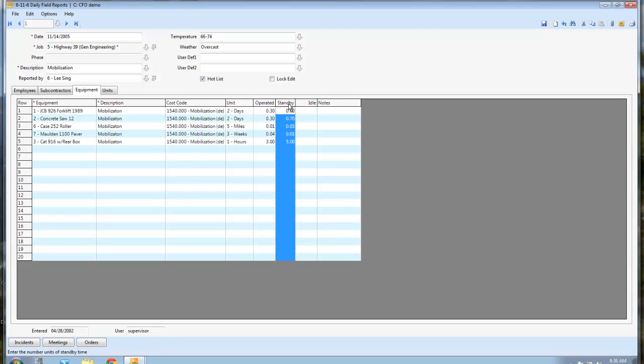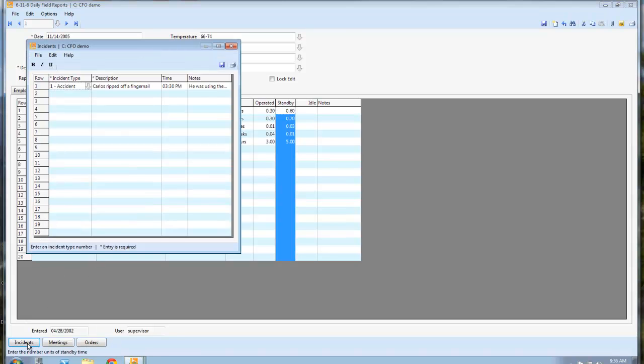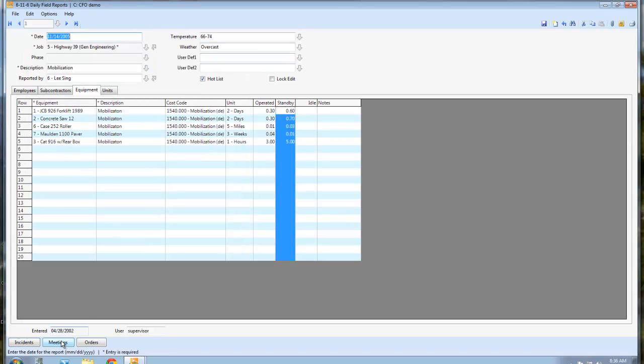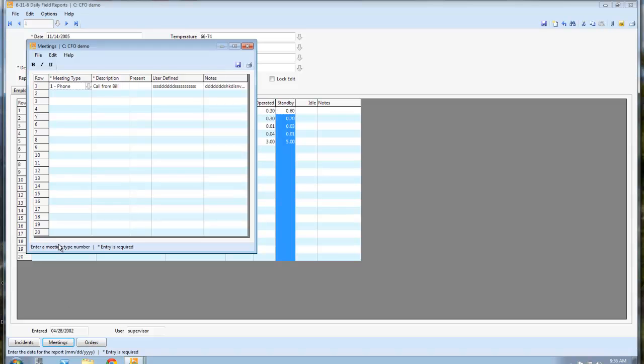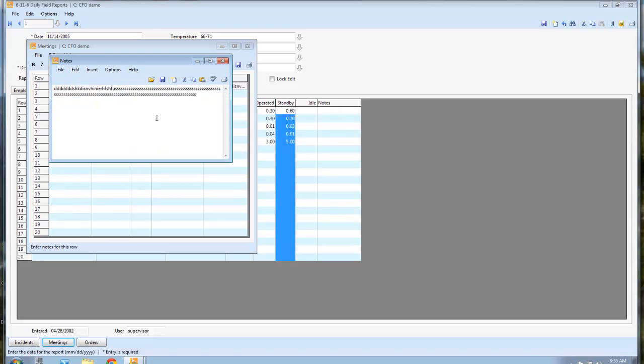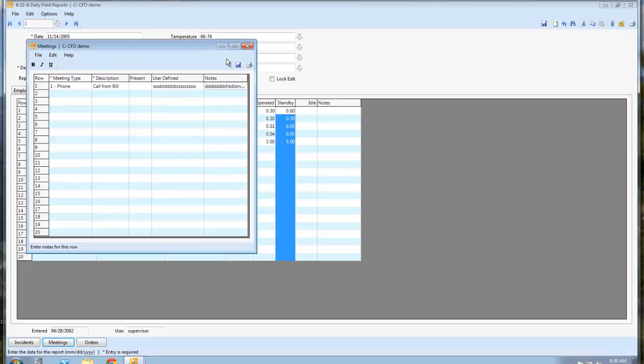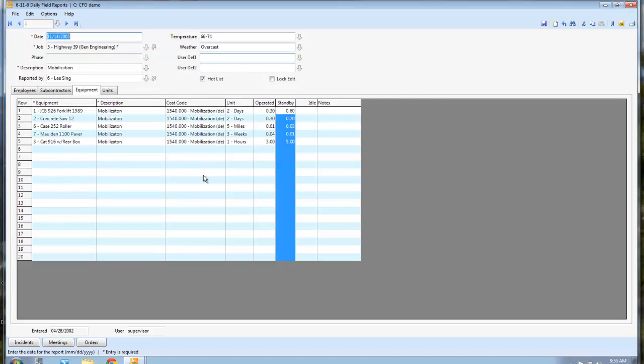If you want to apply your equipment costs to your projects, you would then list your equipment that you had. Same as your employee, what were they working on. And then I'll just open this up—some of these we have recorded in days, some are in hours, it's up to you. And then how: is it operated or standby, so we have multiple rates for that piece of equipment. And then incidents, if I had anything happen out there that they need to know about, I can record it here. If I had any meetings today, what I did, and this notepad's pretty good size, so I can type a lot into here.